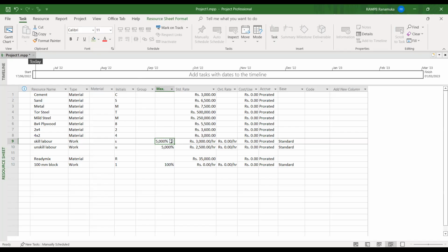If you give the available resources, I told you I will discuss that in the planning stage. So in here, even we give some durations. Calculating the duration is a different task. Those kinds of things will depend on these available labor resources also. So if I have the labor resources only 50, I have to put that.